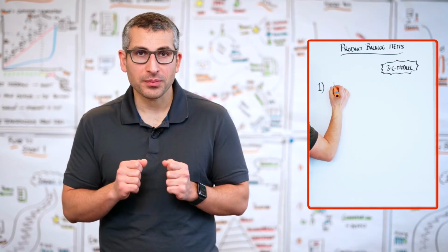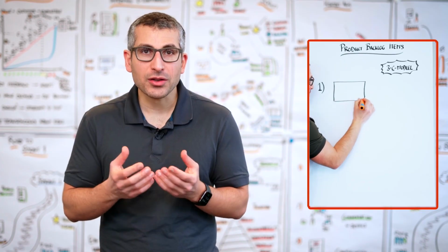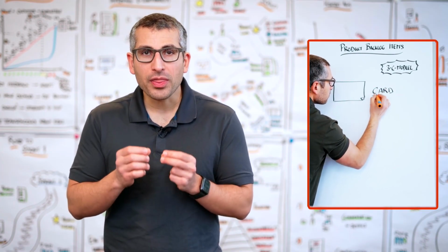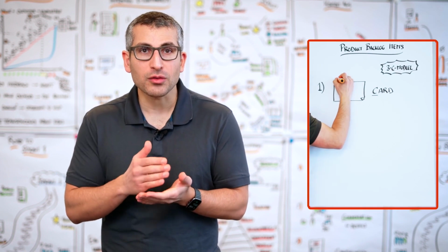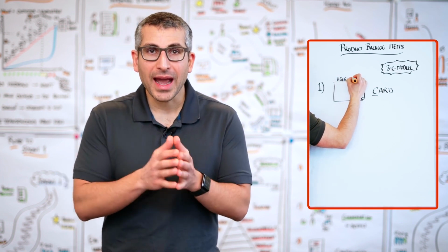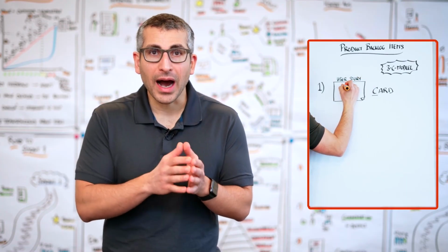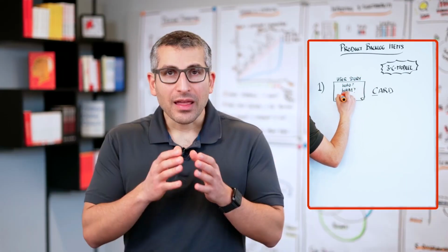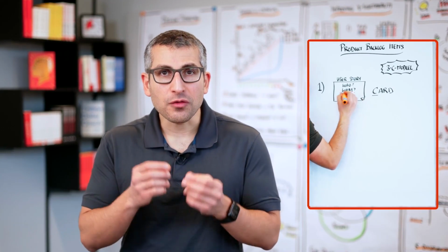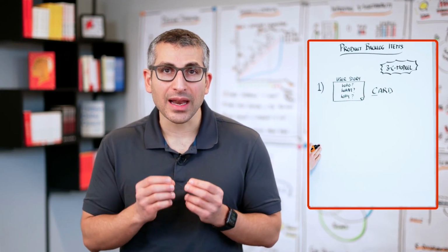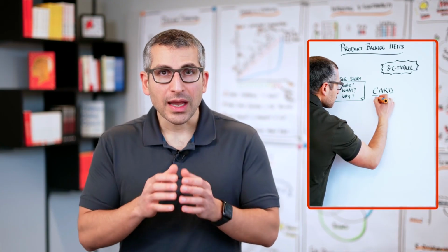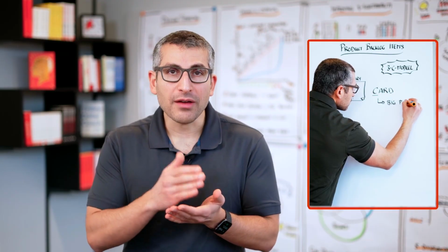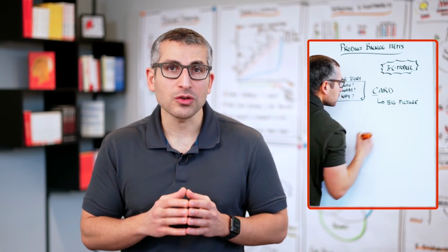This is our card. And the card is an analogy for a bigger Post-it note or for an index card. And on that card, you usually start out writing a user story. As a, who am I, I want, what do I want, so that, why do I want it? That user story helps us to focus on the most essential elements of a requirement. And when we do that, we also deliver the big picture to everyone who reads that specific user story.